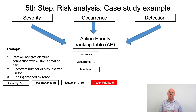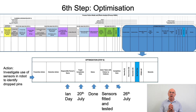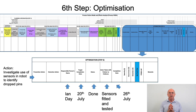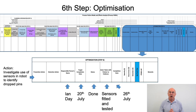To recap the case study example from step five risk analysis: for the failure mode where pins could be dropped by the robot, we came up with an action priority ranking of high. The team said: we have a high risk, what can we do to reduce it? Someone on the team was allocated an action to investigate the use of sensors in the robot that would immediately detect if a pin had been dropped. This was allocated to Ian Day, with a target completion date of the 20th of July.